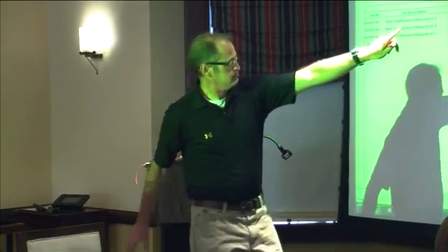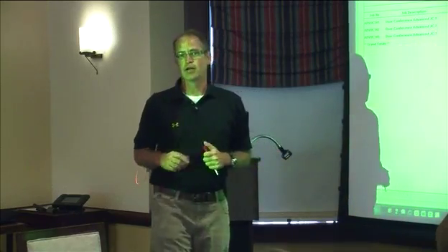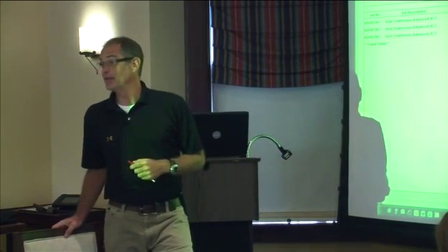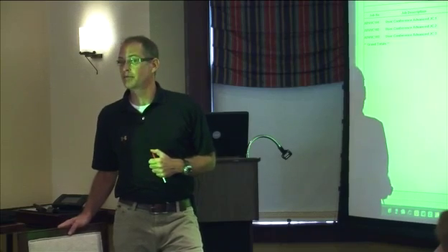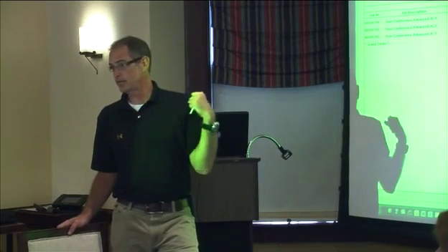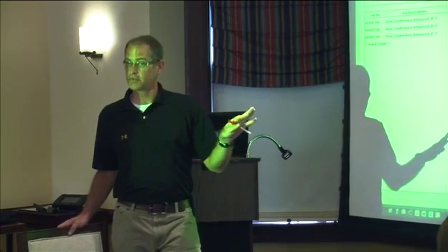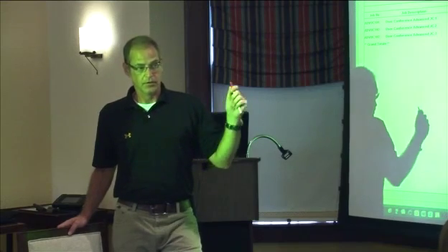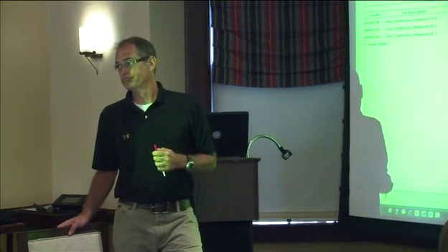This is a bad sign. This is a bad sign here that I've got to adjust my estimated cost by $20,000, and I'm not going to recognize any revenue on it. Okay, sometimes that has to happen. Again, this type of change order would probably be entered in the system to adjust your percentage of completion to make sure that you're not accelerated. Those kinds of change orders can also mean a loss on the project, unfortunately.